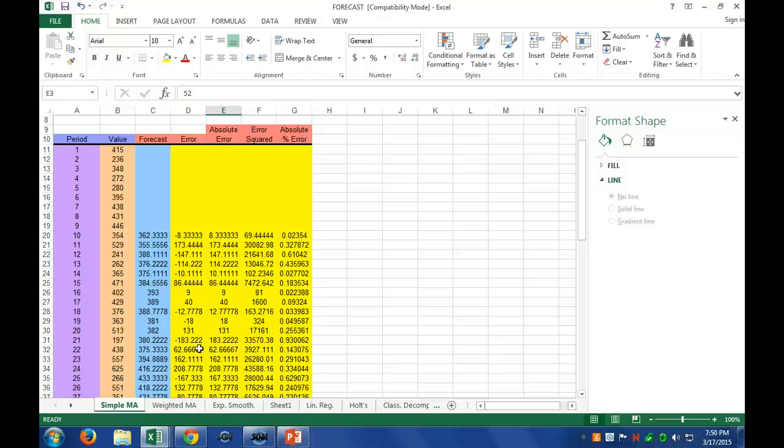For these values, anything over 1 is good and anything under 1 is bad. It's telling you whether you are performing cost-wise above or below the budget. Anything above 1 means you're earning more value than you're spending. And same thing with SPI, ahead of schedule.